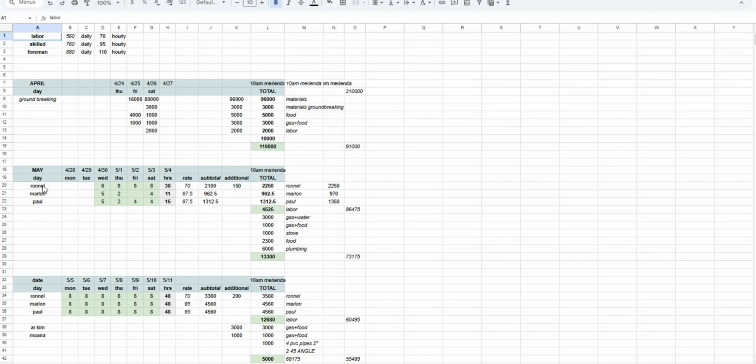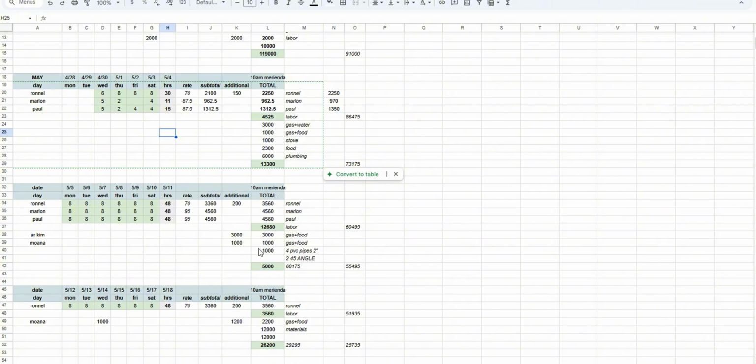For example, in 1 week, almost 4,500 goes to labor for 3 people who are not even in the full day. This is just during barracks and temporary connections. I can spend 12,000 all the way up to 30,000. It will be full force. The same thing can go to labor, because if you subcontract a painter for painting works and he gets laborers and helpers, he will pay them daily. So doing by percentage without understanding how it works might be overpriced or under budget.